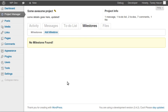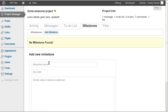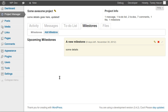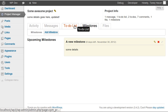Let's look at milestones. There are currently no milestones, so I'll create a new one. I can assign a due date and add some details. It redirects me to the milestone view. I have this upcoming milestone with a title and it shows eight days left. There are three kinds of milestones: upcoming, late, and complete.